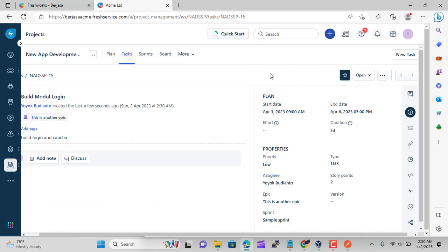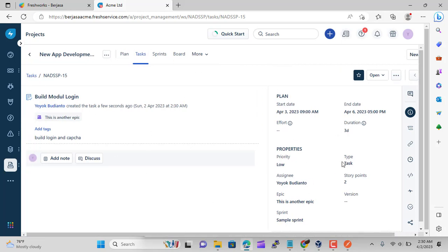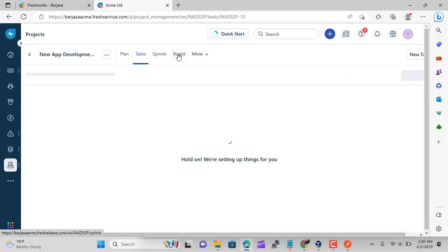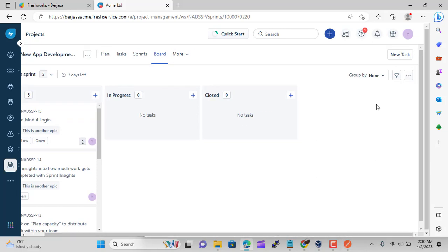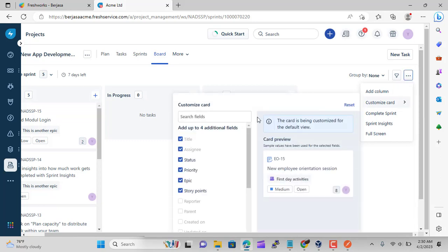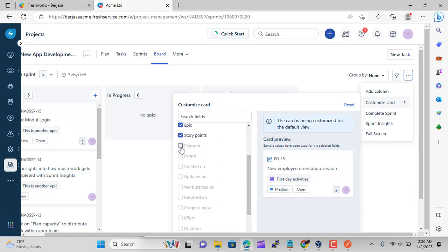How is workload displayed in workload management? Workload can be visualized on a calendar view if it has been planned, partially or completely. You can view it by workload count, the count of items, which needs only planned dates to be filled. Workload hours, the hours per day that have been planned, needs both the planned dates plus effort to be filled. Workload hours as a percent of working hours that have been planned also needs both the planned dates plus effort to be filled. Available hours and available hours as percent are two upcoming views that will be added soon.